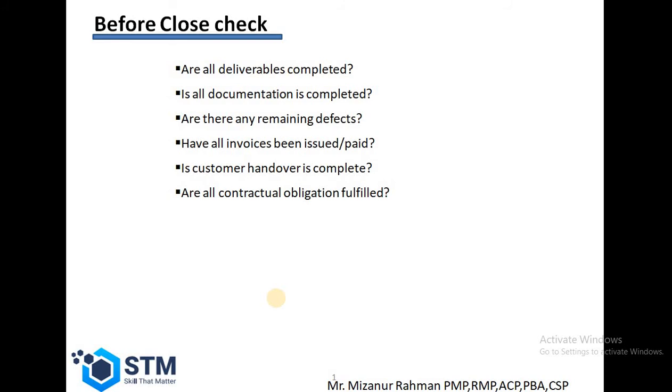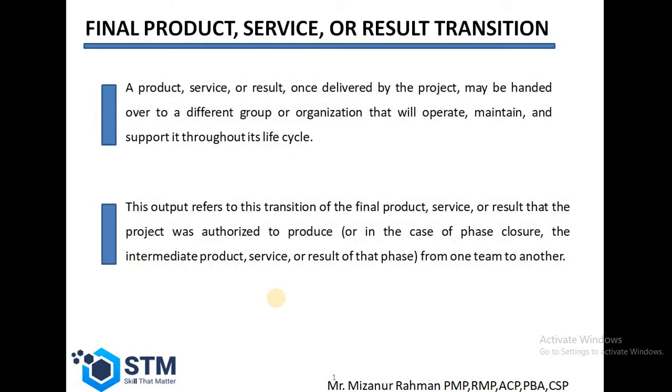Does any defect remain in the project or in the deliverables? Have all invoices been issued and paid? Is the customer handover completed? Are all contractual obligations fulfilled? So before closing, we have to check all these things. Then another thing I want to say: we have to make a plan for project closure in the beginning of the project.